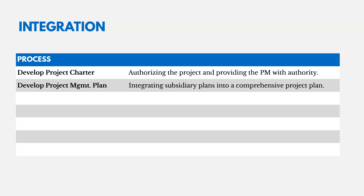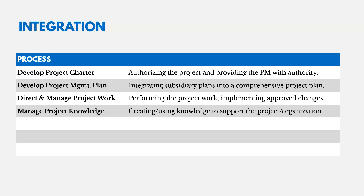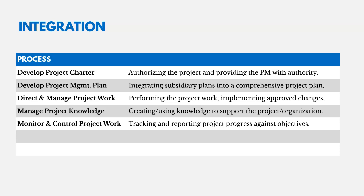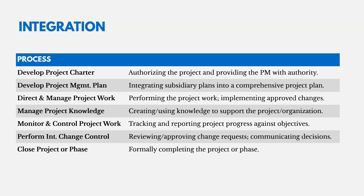Developing the project management plan combines all subsidiary plans — the cost management plan, quality management plan, scope management plan, and others. We then direct and manage project work, performing the work and implementing approved changes. We manage project knowledge by capturing lessons learned for current and future projects. We monitor and control project work to track and report on progress. We perform integrated change control to review and approve change requests. Finally, we close the project or phase, formally completing the work.